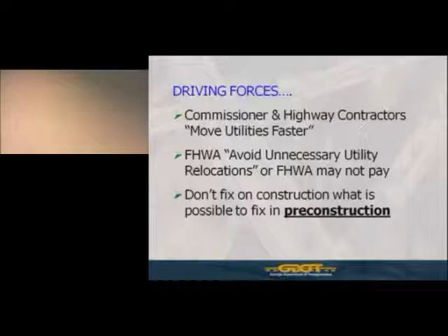The other item on this slide, don't fix on construction what is possible to fix in pre-construction. All of us are aware that it's far more costly, not only in dollars, but in delay cost and so forth to the traveling public, to resolve issues on construction. And when we have a utility delay on construction, there's a lot of factors that go into what impact that utility delay creates. It's always more prudent and cheaper to resolve an issue in the pre-construction phase. And that's part of our intent with this revamping of the utility adjustment schedule, in order to secure the project schedule on the construction side.